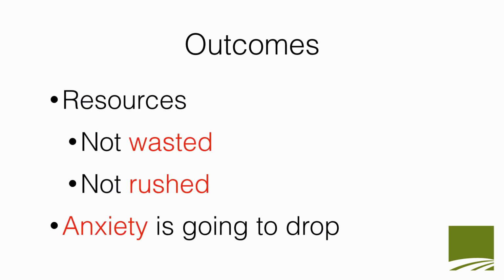So what are the outcomes, or what can we expect when we utilize the split project approach? First, our resources are not going to be wasted. What happens currently if you work on the ICD-10 project for 8 months and then it's delayed again, and then you work for another 8 or 9 months and it's delayed again, and then you work for a year and then it's delayed again? When you get your prep work done, it doesn't matter when the deadline is set. You've already done the heavy lifting, and you're not risking rushing your resources by procrastination.